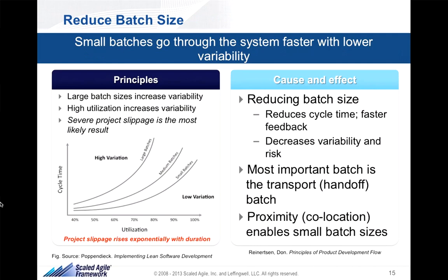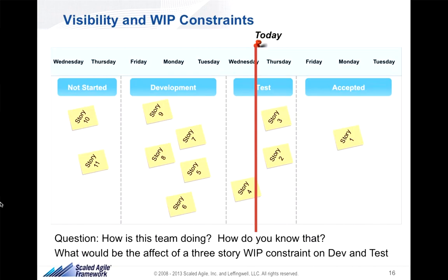it because we've taken systemically the wrong approach, an approach that says, oh, let's figure out all the requirements. That's a big batch. Let's hand it off to code. Okay, that's a big batch. Let's hand it off to test. Everybody is busier than heck. We have fundamentally designed a system that creates inherent variability.